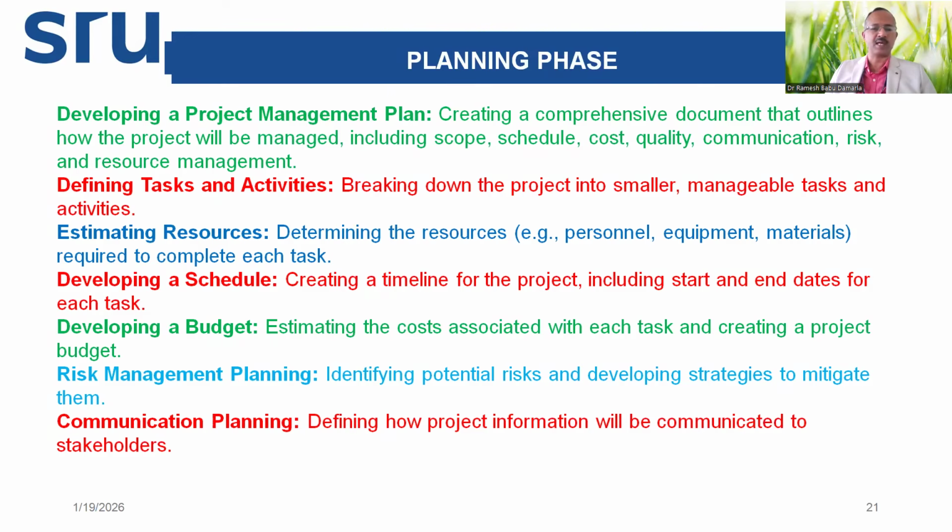Then the communications plan. We clearly define what kind of communication requirements are there for all the stakeholders, how it should be communicated, formal, informal, mail, fax, how it needs to be communicated, what kind of templates are required, develop those templates, clearly define for everybody when to communicate and what to communicate. For example, milestone reports are required to the top management.